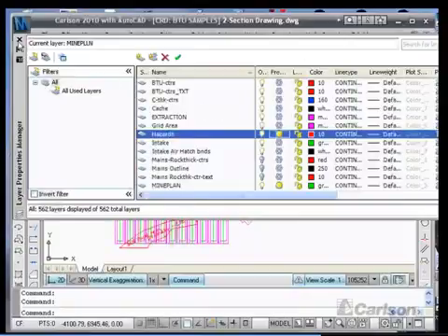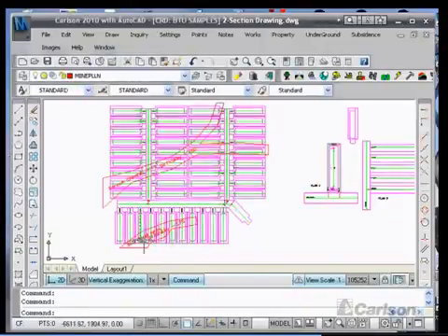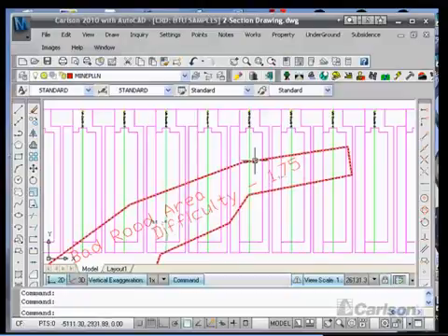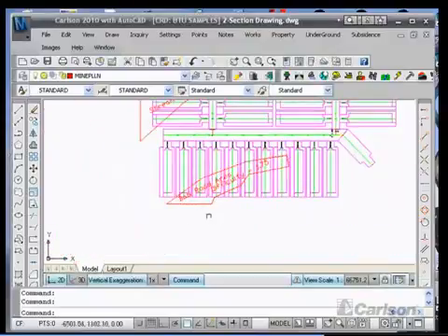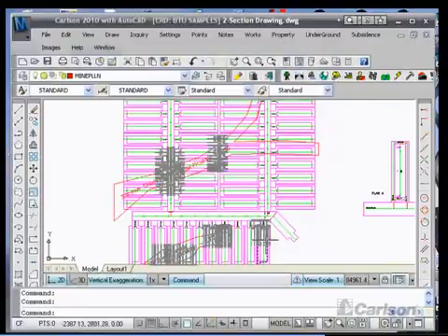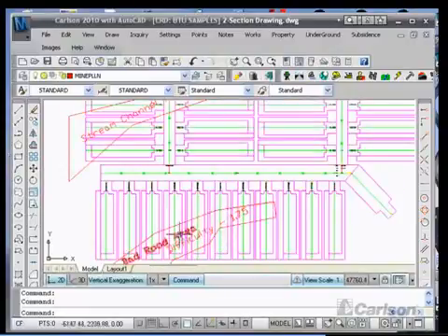And at this point, if I show you this, the bad roof area has a difficulty in here of 1.75. This is an inclusion perimeter, and a grid was made. Originally, the grid had values of 1 throughout this area, but inside these inclusion perimeters, we set the value up to 1.75 to represent the difficulty posed by bad roof here.